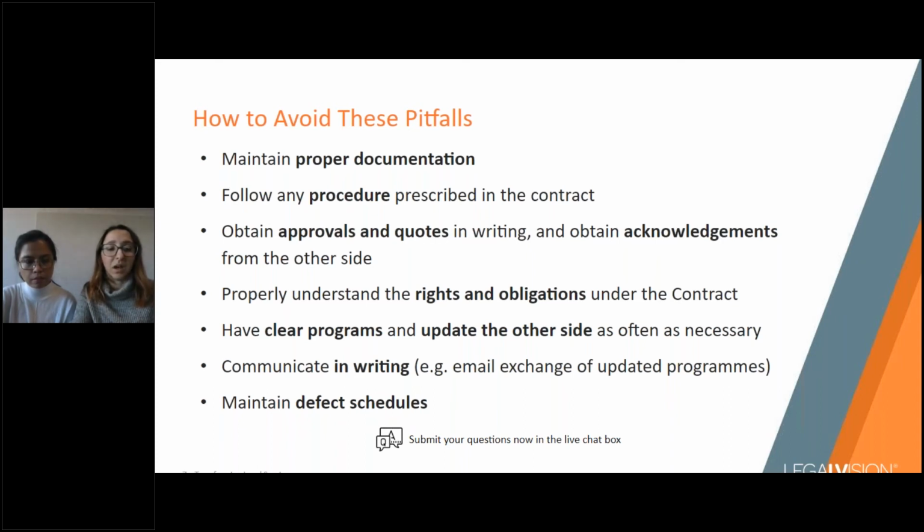By way of an example, we've assisted in a previous dispute as to whether or not a builder was entitled to certain bonuses under a construction contract, including bonuses for reaching practical completion early. What was interesting under this contract is that the calculation of the date of practical completion was based on business days, but the calculation of the bonus date was based on calendar days. So in fact, the dates arrived at were quite different. And in that case, the builder had not properly understood those intricacies of the calculations under the contract and had laboured on the assumption that it was entitled to a bonus when in fact it wasn't.